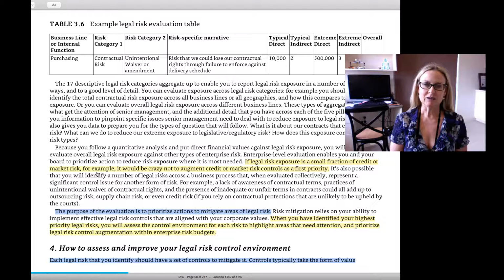However, you can see in the process of arriving at those figures, there is still some subjectivity and forecasting that has to necessarily go on, because we're assuming that that risk actually hasn't occurred, and so you can't actually quantify it with real-world figures and real-world data. But nevertheless, it certainly looks a lot more hard and fast than perhaps something like the consequences / likelihood matrices that are used by ISO 31000 and the HB 296.